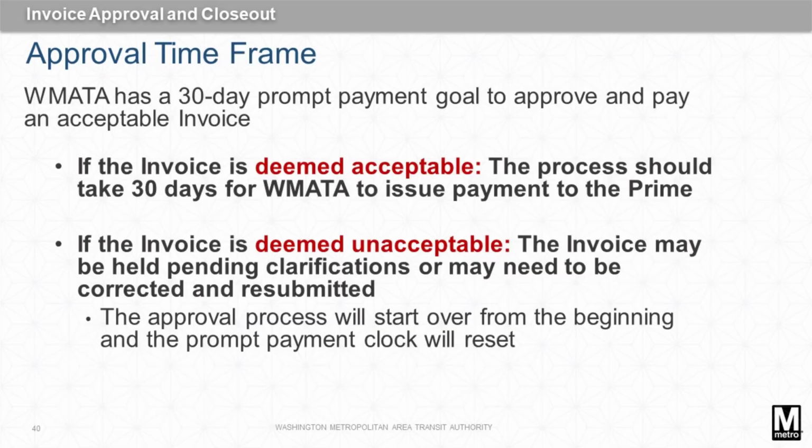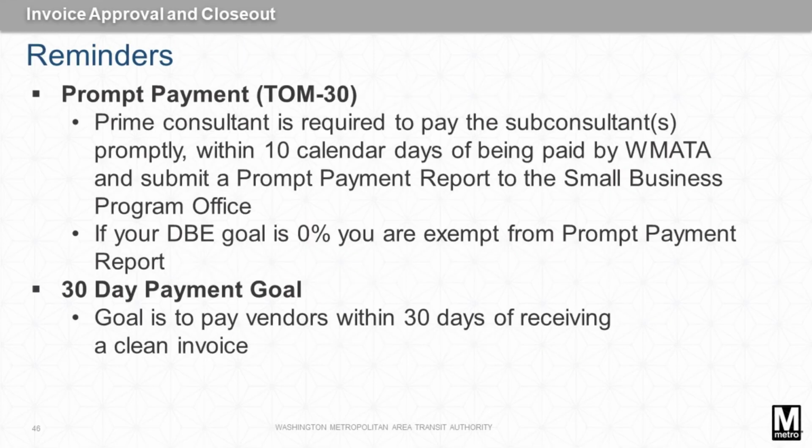If the invoice is deemed acceptable, the process should take 30 days for WMATA to run through the multi-step approval process and issue payments to the Prime. In turn, the Prime consultant must promptly pay sub-consultants within 10 days of being paid.